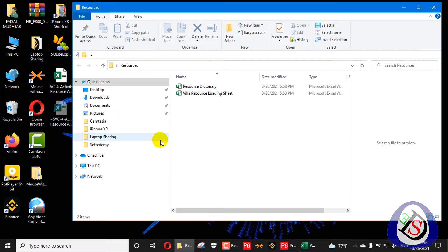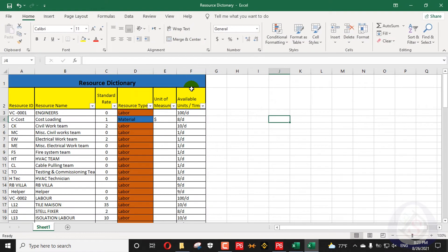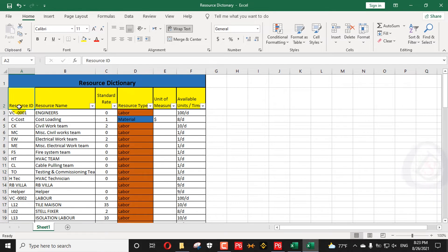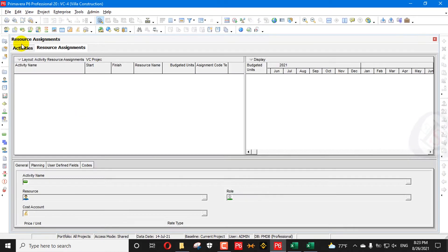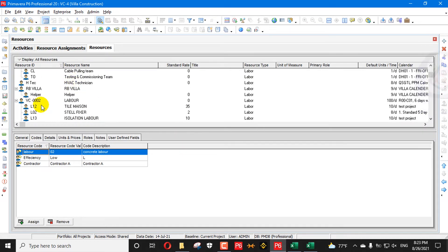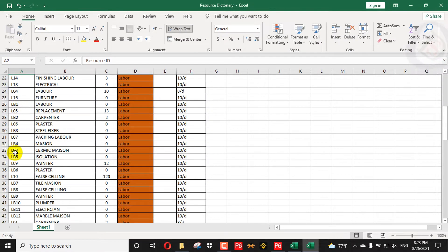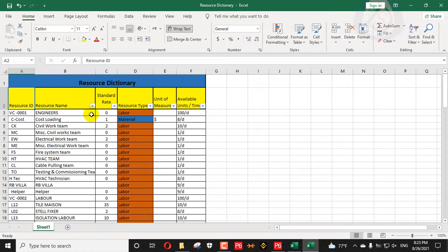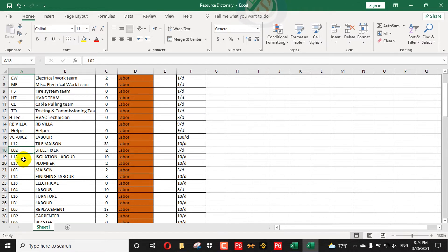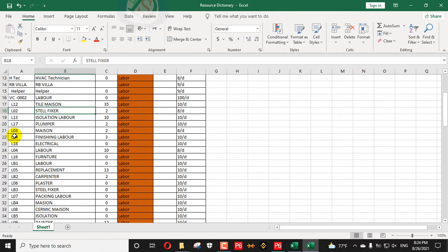Before doing the export, I created a resource dictionary. This dictionary contains Resource IDs matching exactly what is created in Primavera P6. You can see resource 002 and all resources as created in Primavera P6. I will pick up values like L02, L03 from this dictionary and use them in my Excel sheet.